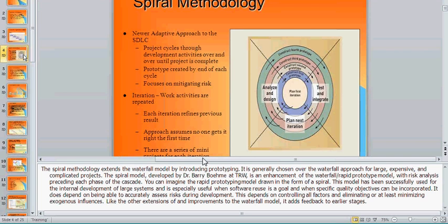Because you broke it down into 2 sub-projects, and you are in the analysis phase of release 1, you probably only used 10% of your overall budget. So do you think you brought down your risk any further? Yes or no? Everyone understand how I said that the risk went down?